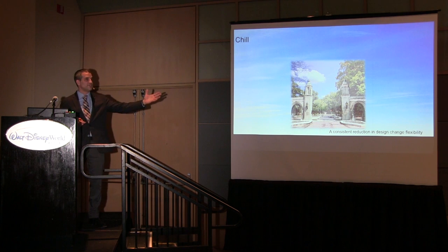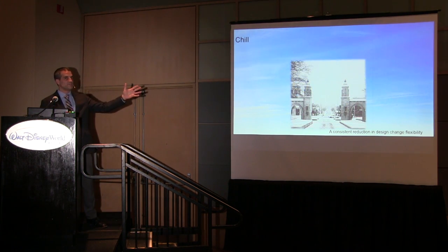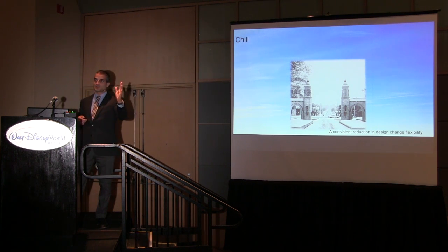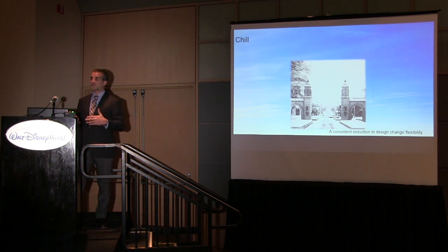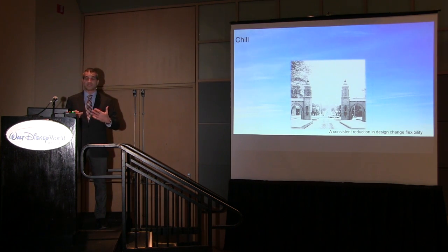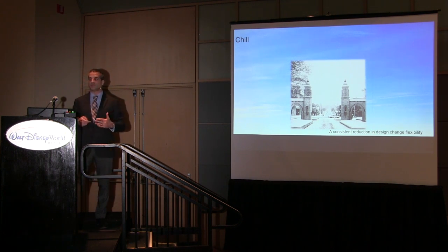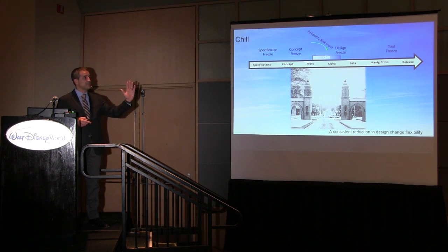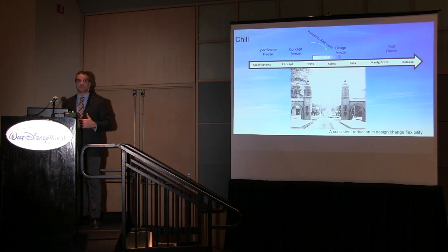Why don't we call it a chill phase as things slowly firm up? Because there really should be a gradient of difficulty of changing the schedule and the freeze point as you get closer to it. And so you effectively have to make a stronger quantitative value justifying that change as you get closer. What if we could do that? What if we could do that simply? And you had this designated period where you've set up times to have input to help decide if it's justified to adjust the schedule. So a chill phase, not just having formal freeze points.